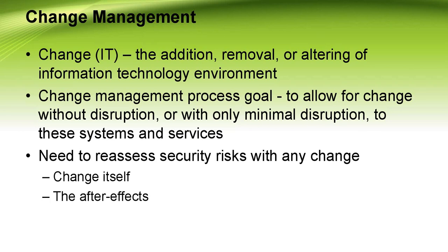Many changes are proactive. Again, organizations grow and evolve, and they might continually be seeking to improve or stake out new opportunity. Change is required to achieve such goals. On the other hand, change can be reactive. Consider the requirement to patch an operating system to shore up recently identified vulnerabilities. For a mature organization, this process is part of normal change management procedures. In some instances, such as zero-day or high-risk vulnerabilities, a patch requires an emergency change.